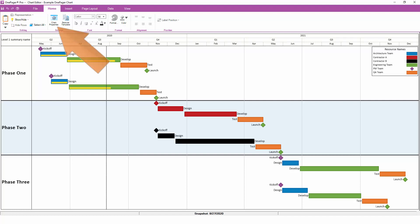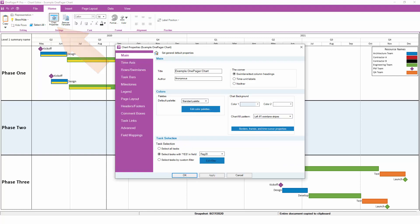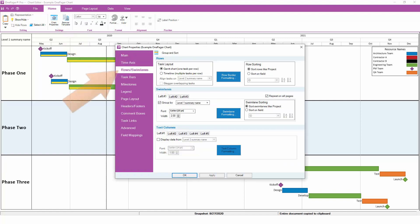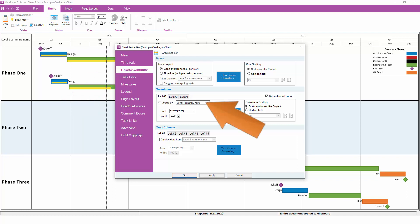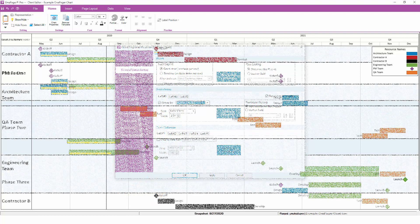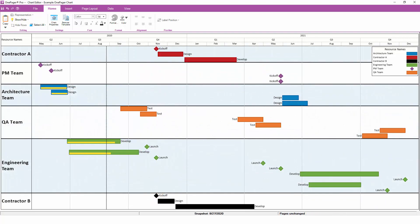To change your swim lane groupings, go to Home, Chart Properties, Rows and Swim Lanes. The default swim lane grouping is set here. To change things around, we could instead choose to group by resource names. When we click OK, OnePager is going to regroup and re-sort everything based on the resource assignments so that the swim lanes look like this.